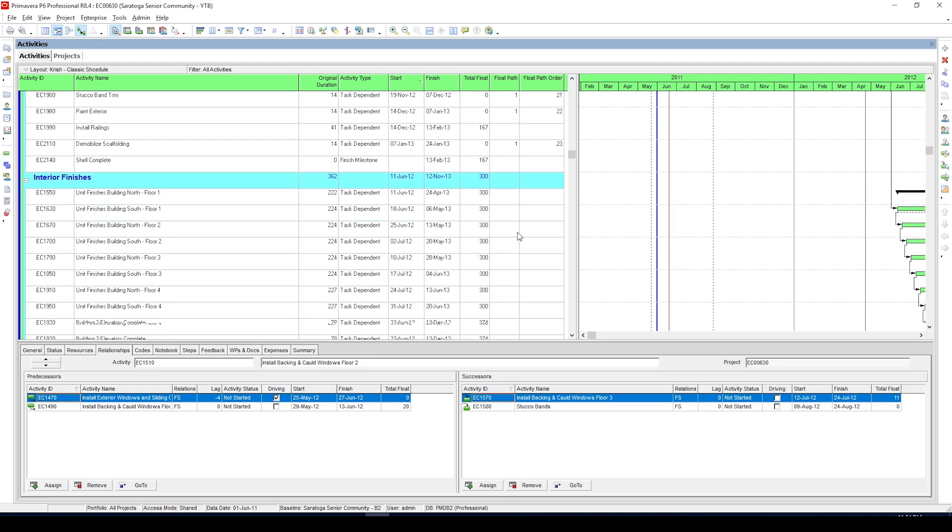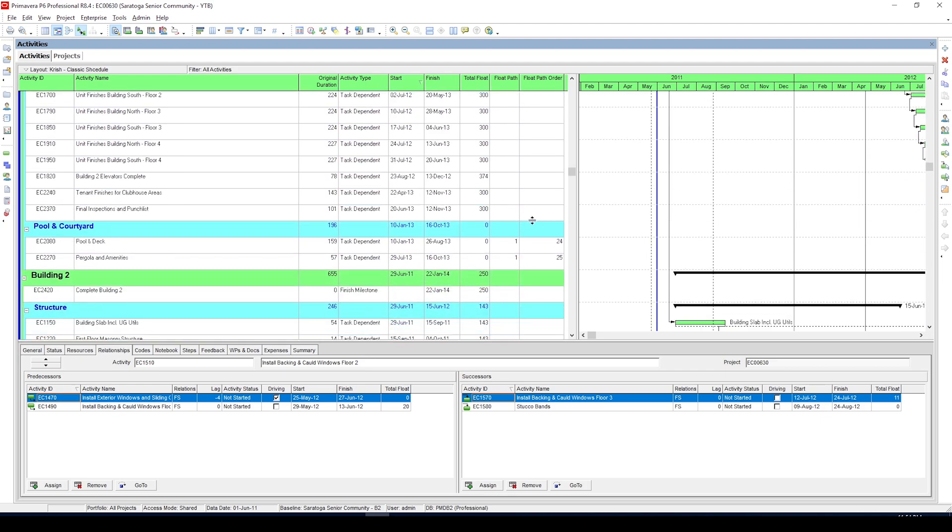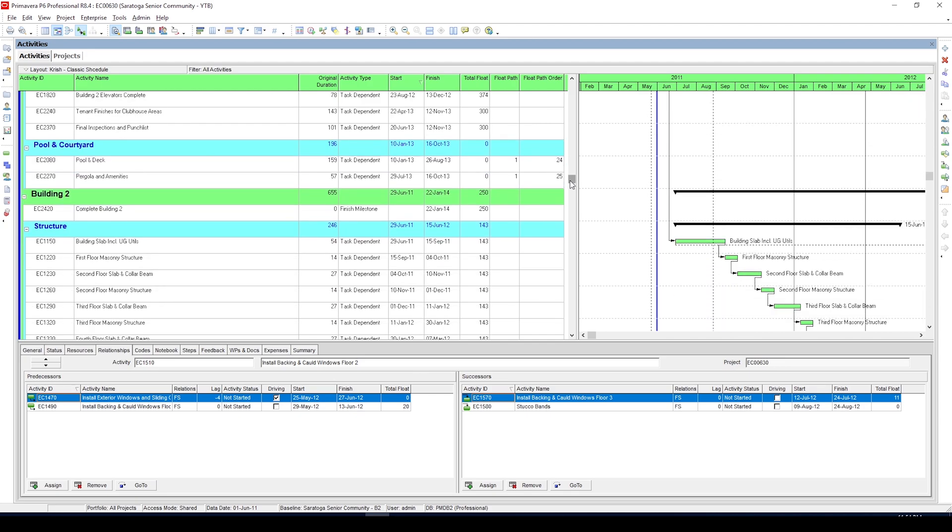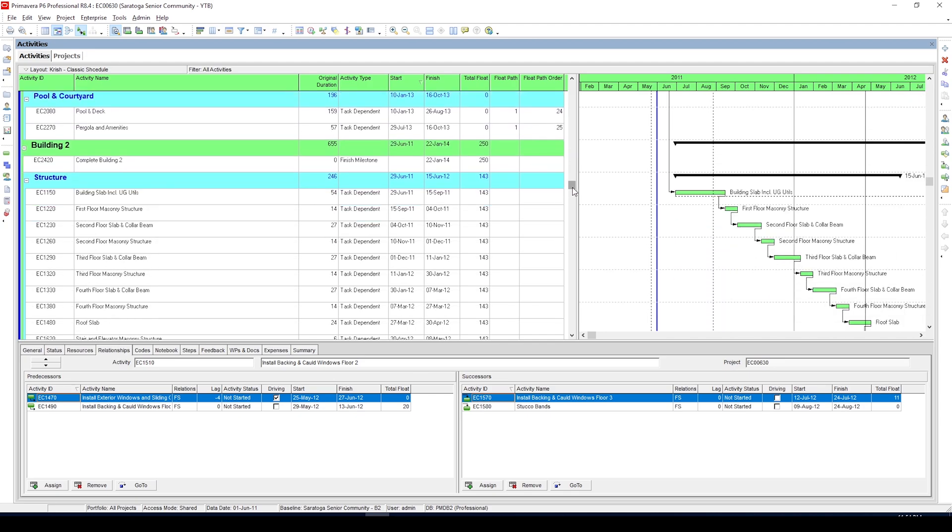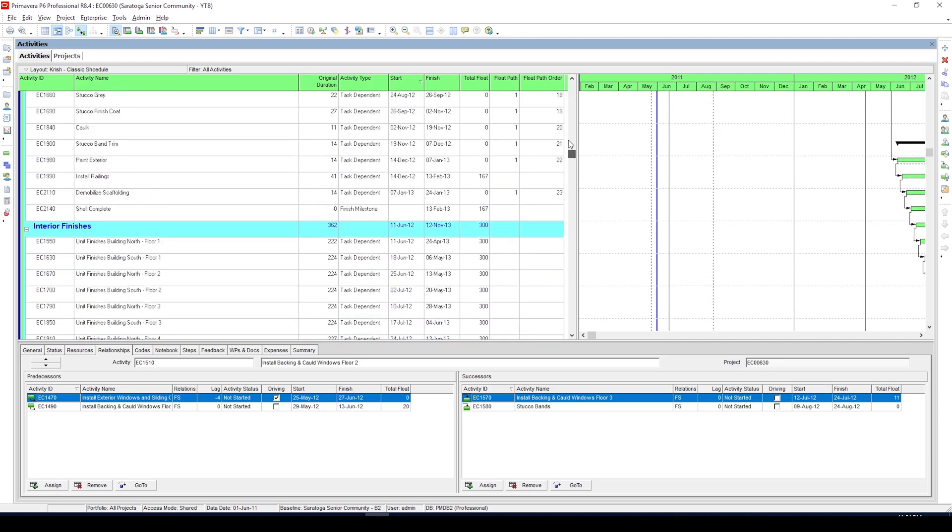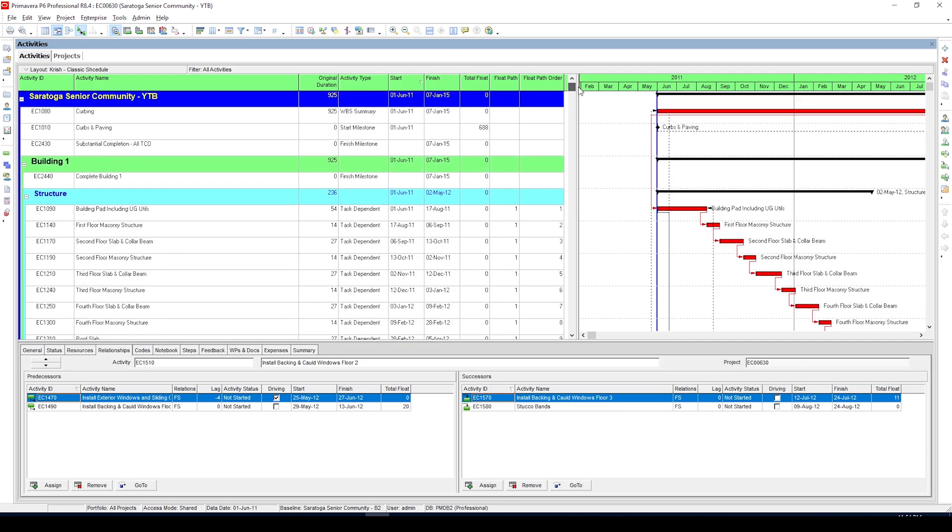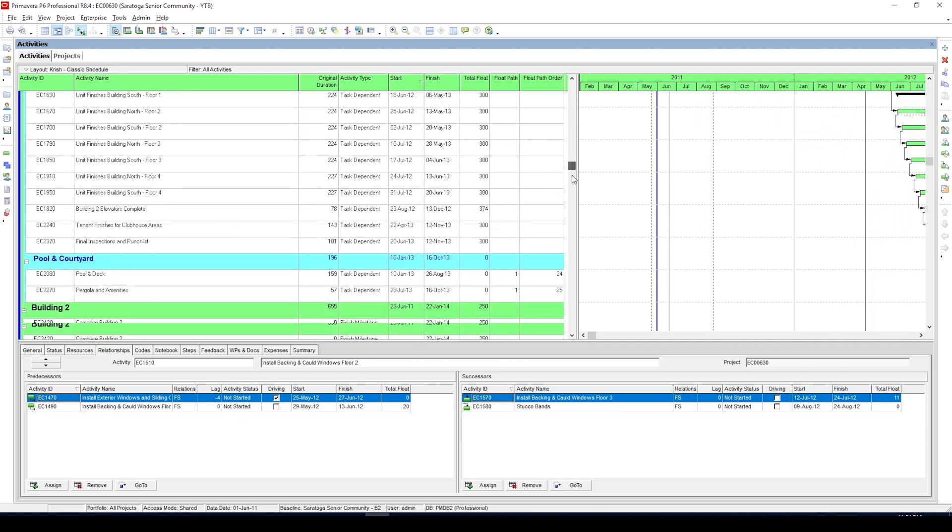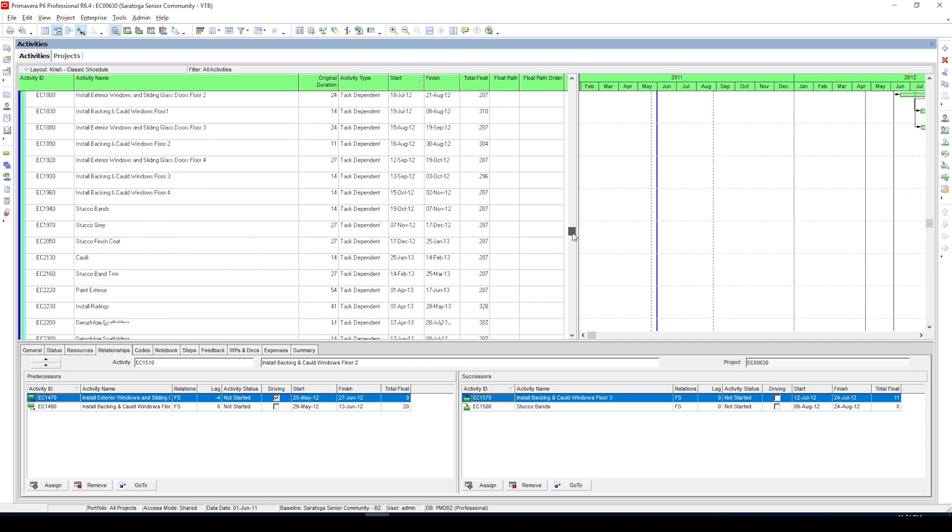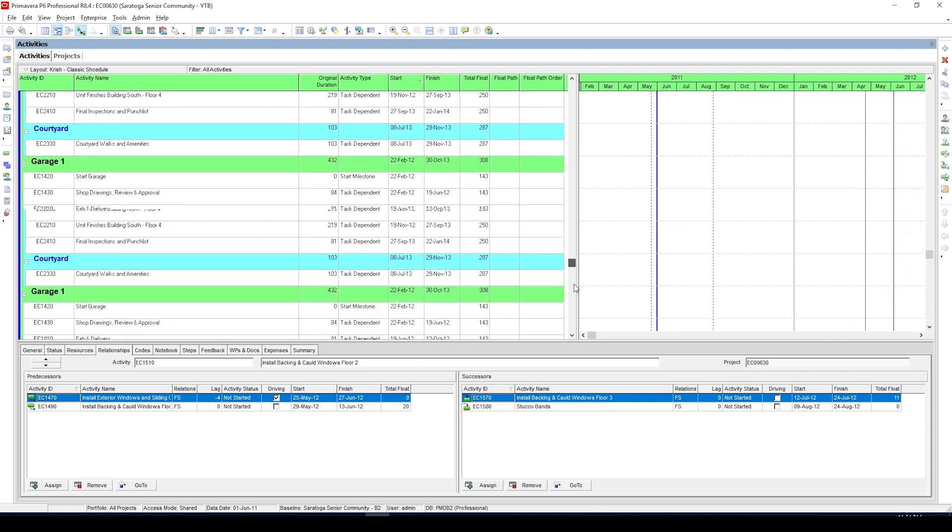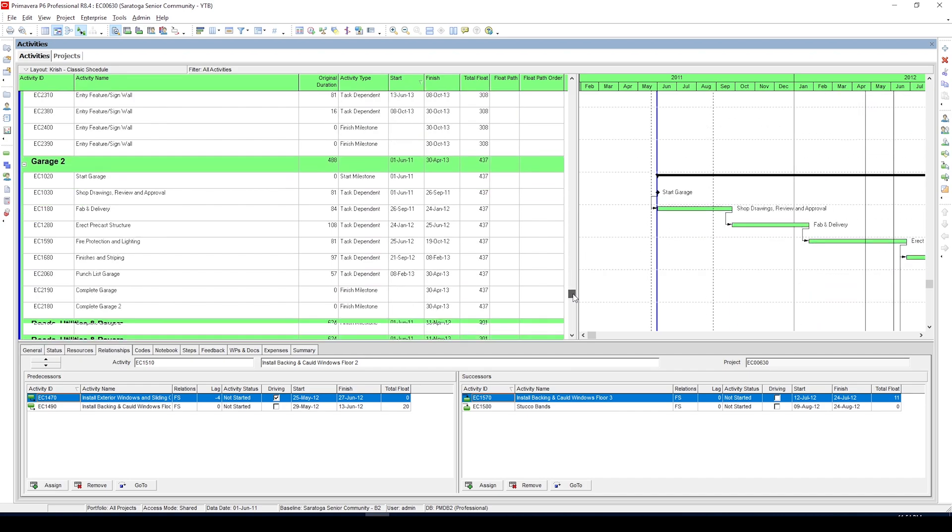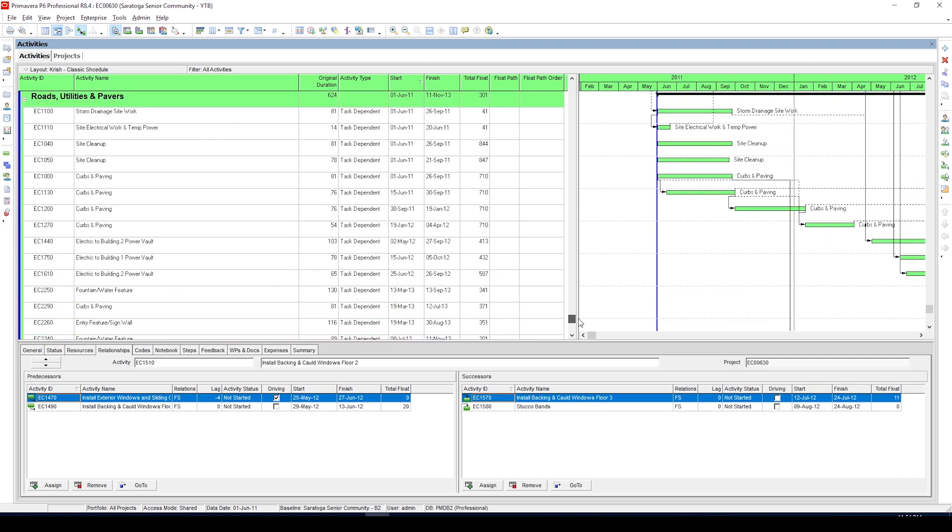What this actually means is activities under float path 1 are most important or should be considered as critical to project completion, and activities under float path 2 to 5 have the potential of becoming critical and are considered as near critical activities.